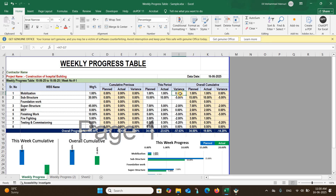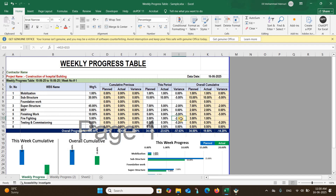Variance means the difference between planned and actual values. For example, if we planned 1% and completed 1%, variance is 0%. If we planned 15% and completed only 10%, the variance is negative 5% — you are dragging behind. It's negative because we planned at a certain level but did not achieve it. Sometimes you may exceed the plan — for example, planned 7% but achieved 15% — which gives a positive variance.